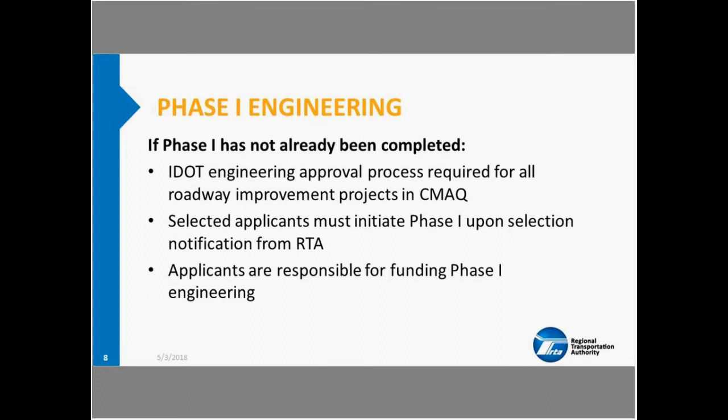So, phase one engineering. This is a topic that comes up pretty frequently in these projects. Applicants that we select for Access to Transit are asked to initiate phase one engineering upon notification from the RTA that we're selecting your project. This is necessary because phase one engineering has to be initiated prior to applying to the CMAQ program. Unfortunately, Access to Transit does not provide funding for phase one engineering at this time, so it is the responsibility of the project sponsor to fund phase one if it's not already complete.